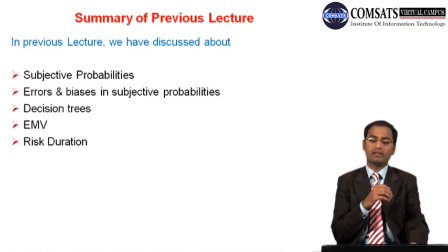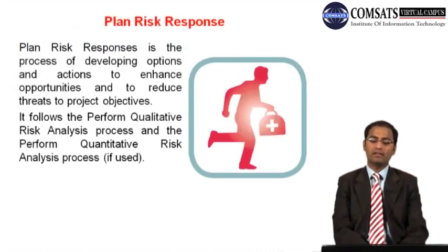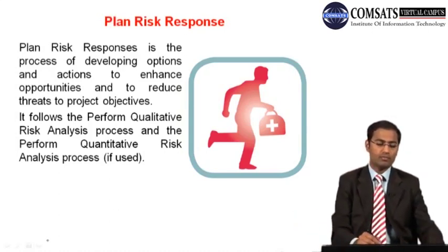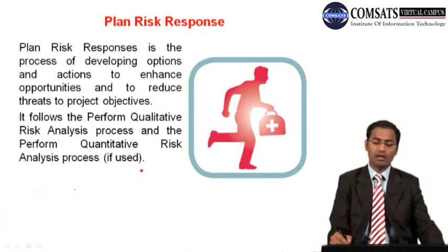Now, what is this thing? Plan risk response is the process of developing options and actions to enhance opportunities and to reduce threats to project objectives. It follows the perform qualitative risk analysis process and the perform quantitative risk analysis process if used. That is very important. At times we are using simply identification, and then we have a list of probable responses, and then qualitative analysis.